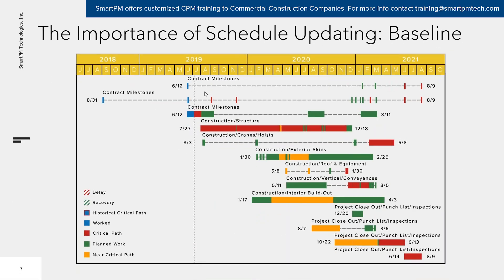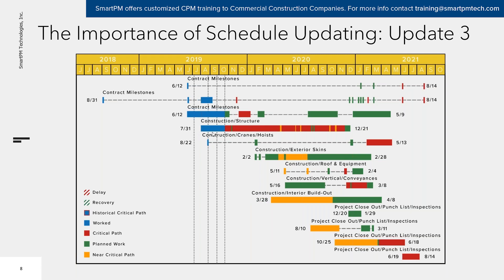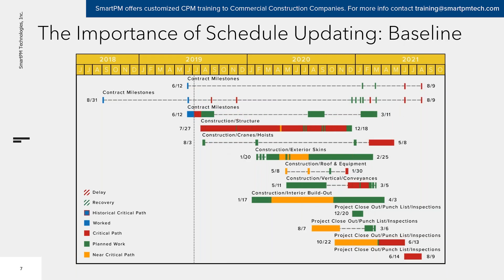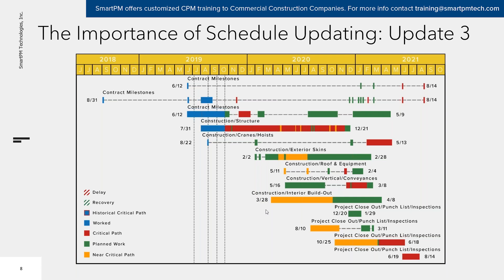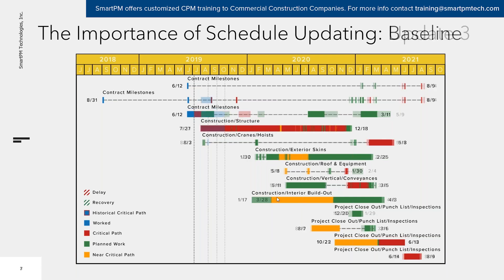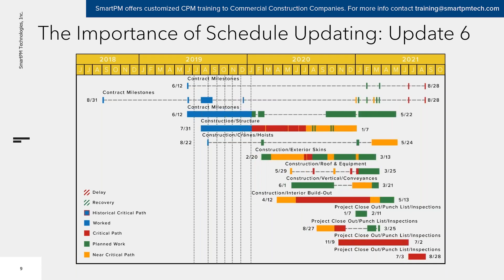Here's a visual example from SmartPM showing why updating is important — it's a one-page representation of a project showing critical path and near-critical path across different update periods, typically monthly, which is usually a contractual obligation. I prefer weekly or every two weeks, but monthly is generally the minimum. Looking at different updates, you can start seeing things moving around — similar critical paths early on, but then you start seeing shortening of durations or items getting pushed out.